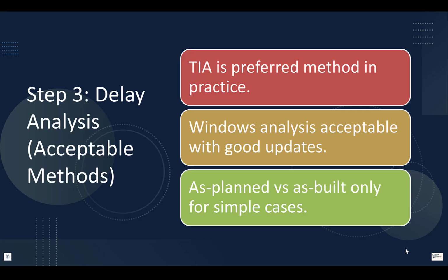Fourth, collapsed as built. This is hypothetical. This is highly technical, used mostly in arbitration, less accepted during project execution. So the best practice rule: choose the method based on project complexity, not contractor preference.